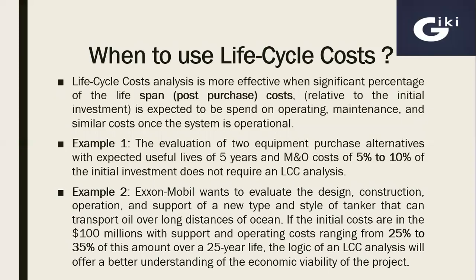So here is another example. ExxonMobil wants to evaluate the design, construction, operation, and support of a new type and style of tanker that can transport oil over long distances of ocean. The initial costs are in the hundred millions, with support and operating costs ranging from 25 to 35% of this amount over a 25-year life. Now, the operating and maintenance expenditures are between 25 to 35% of the initial investment. So this is a significant amount. In that case, we will use life cycle cost analysis to compare this project.